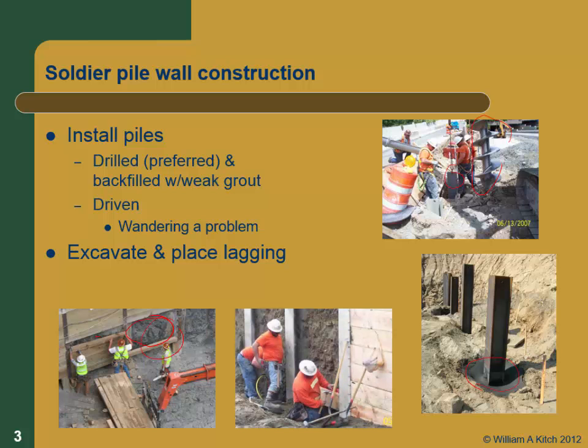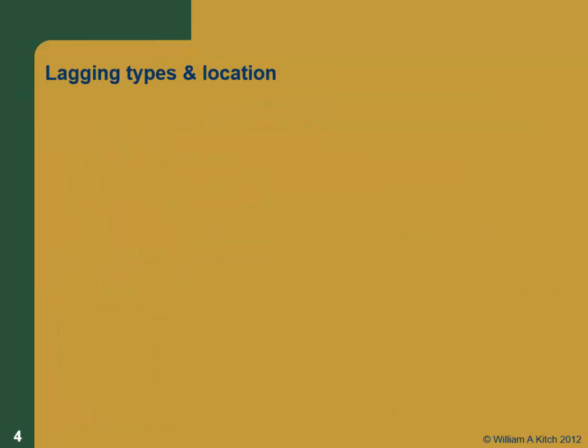And here's just another picture, and you can see there's quite a bit of distance here that is open above the lagging. And then once you've got the lagging installed, you install the support. Sometimes you'll install the support and then excavate down and put the lagging, but the details of when each one of those occurs will depend on your design.